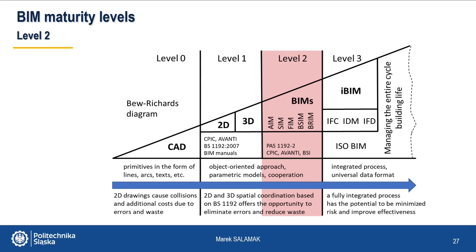This is sometimes referred to as proprietary BIM, or in short PBIM. The UK government's construction development strategy states that the government will require full BIM 3D interoperability with all electronic project and asset information, documentation and data. It is therefore the minimum BIM requirement of level 2 for UK public projects.